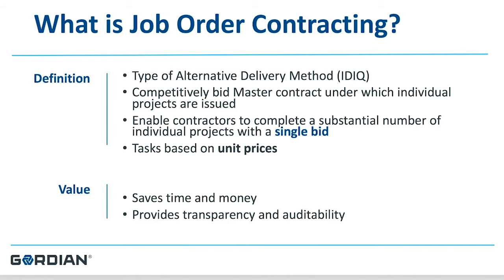Job order contracting is an indefinite delivery, indefinite quantity type of contract — IDIQ. All job order contracts are a competitively bid master contract that enables contractors to complete a substantial amount of work with one bid.